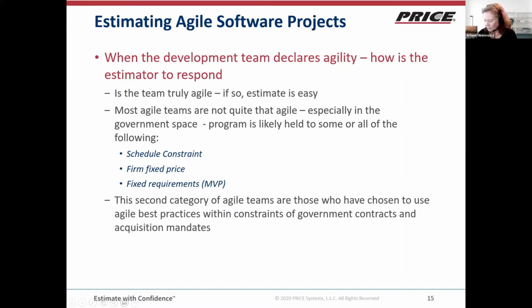There's a schedule. I've got 6 months to complete this project. I understand I have a backlog. My customer understands that we're going to do 2-week iterations, and that at the end of the schedule, we're going to deliver as much as we can get developed in that time period, based on their interface with the team and their reprioritizing, maybe adding new requirements, eliminating some of the backlog. If it's truly Agile, then you know how long it's going to take, you know how many people are on the team. It's math.